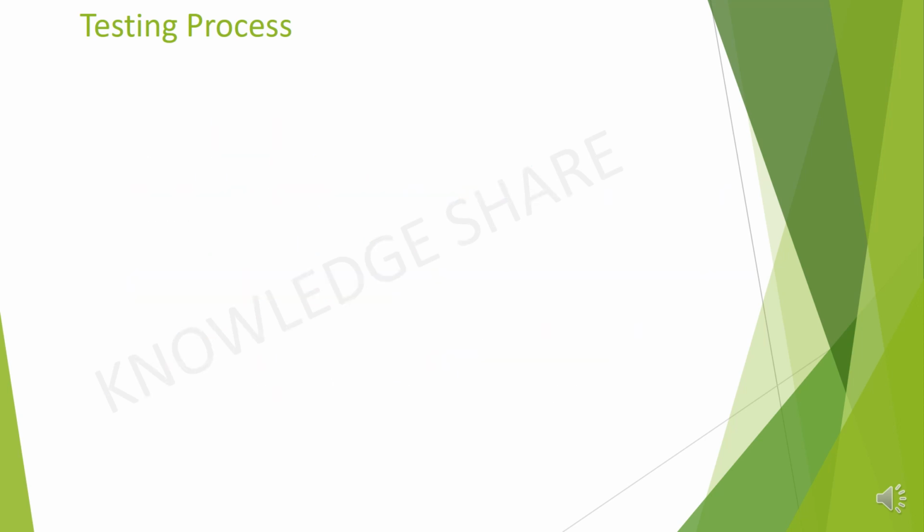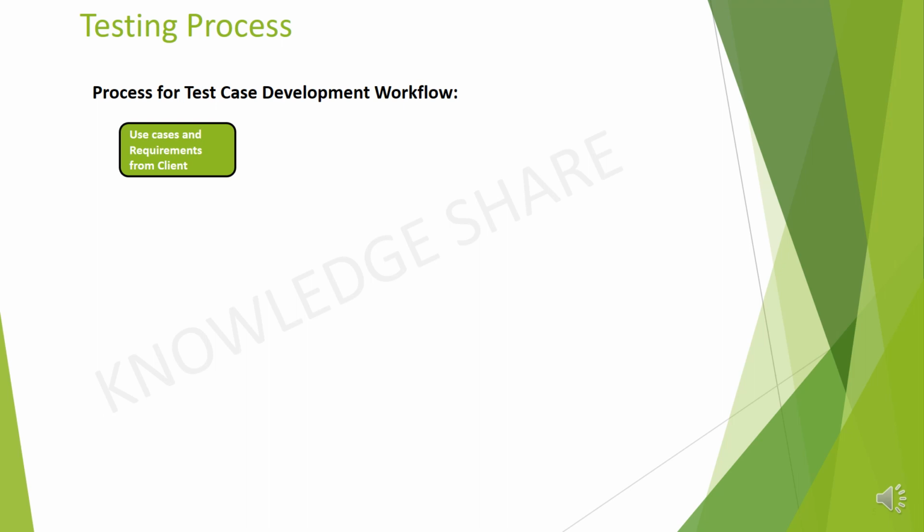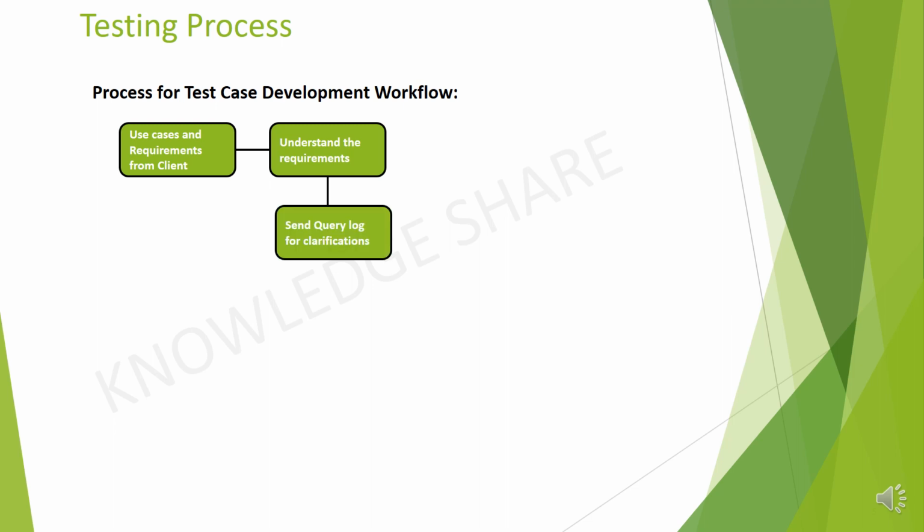Next question. Process for test case development workflow. It starts with use cases and requirement from client. Then understand the requirements. Send query log for clarifications.